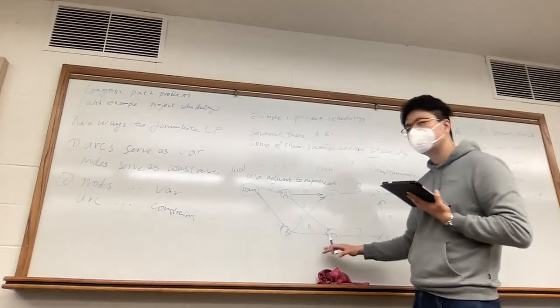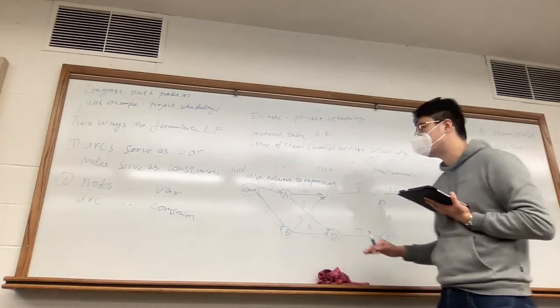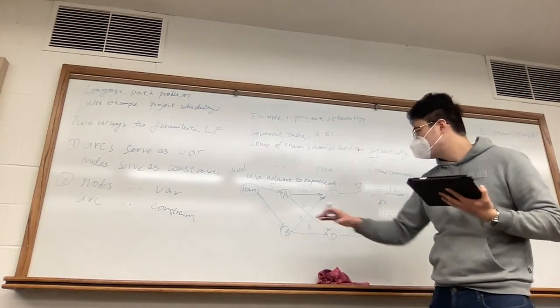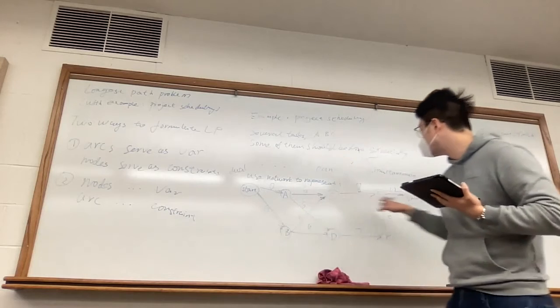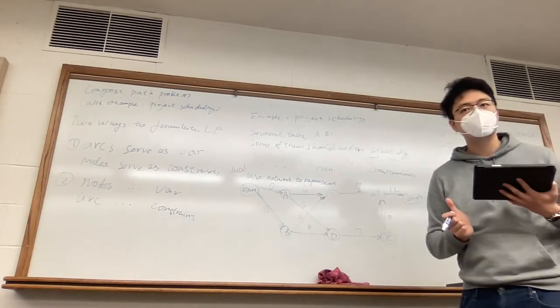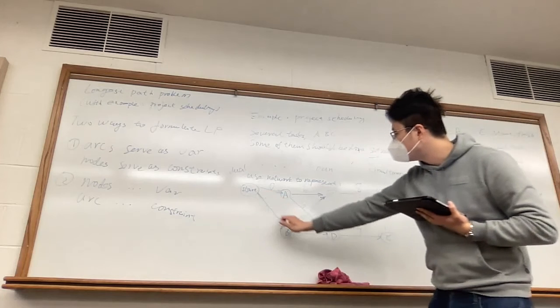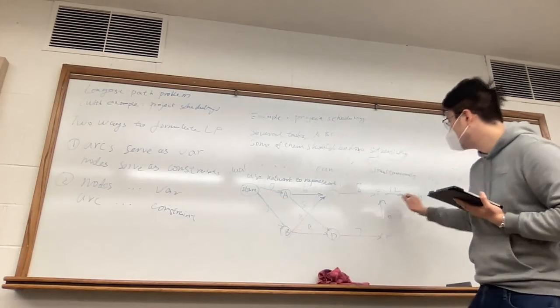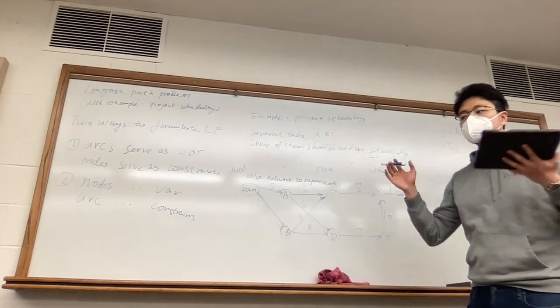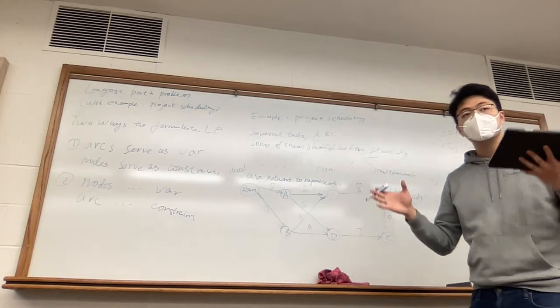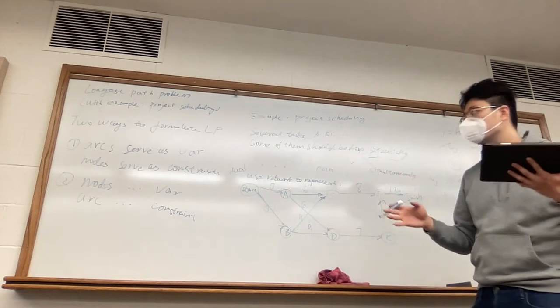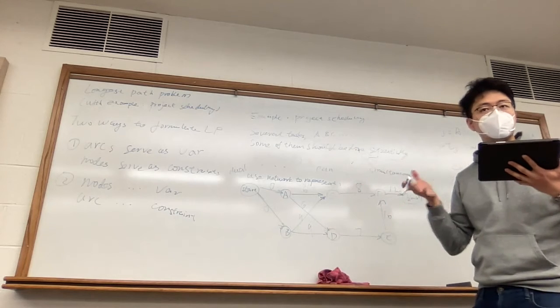So this problem actually is also finding the longest path. But why does finding the longest path from start to finish make sense? This means that as long as you can find the longest path from the start to the finish, this is the minimum time that is required for you to complete these tasks. Think about it, why?